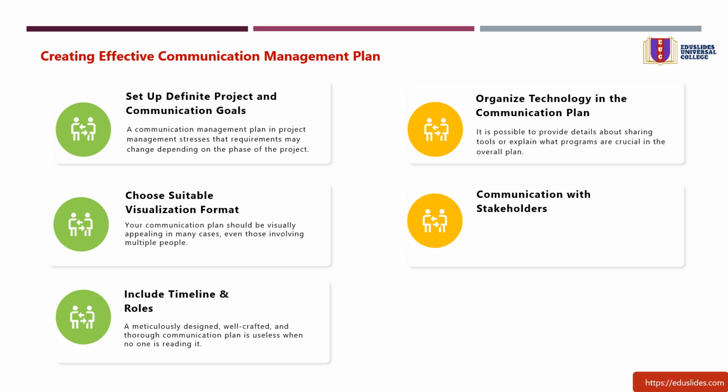5. Communication with stakeholders. The team working on the project is not the sole entity that is covered in your communications plan. It is important to provide details regarding communication with clients and how you usually communicate with your stakeholders. Determine who needs to attend these gatherings, what information or disruptions the stakeholders should be aware of, and so on. Typically, your customers and other stakeholders don't need regular updates. They also don't really want email notifications for every task accomplishment.